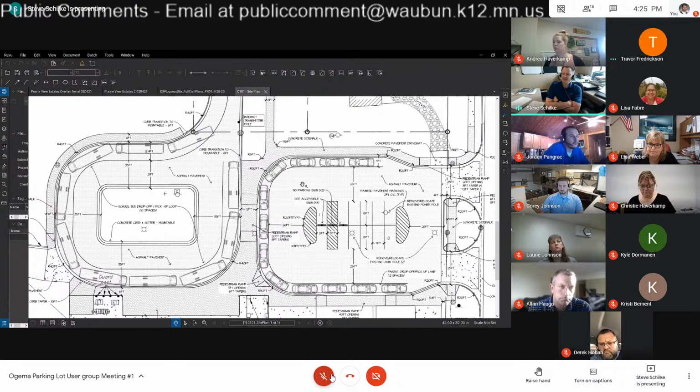The limit is 1 acre of new impervious. So if our project adds 1 acre of new impervious, such as parking and paved areas, then we have to treat that water, such as with a wet pond.